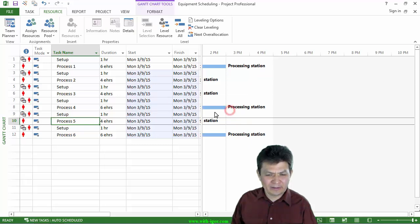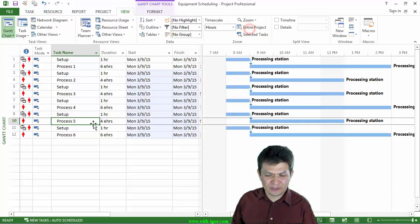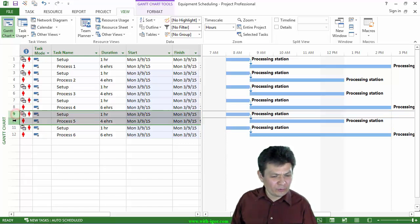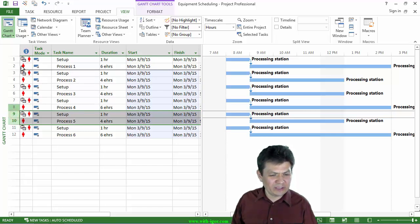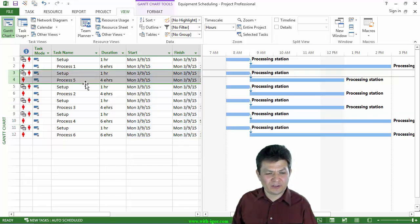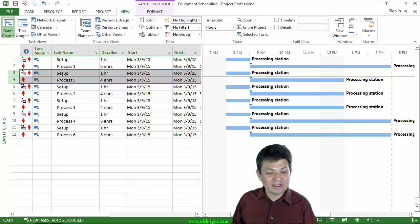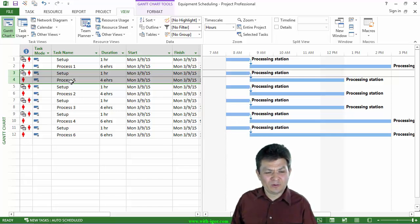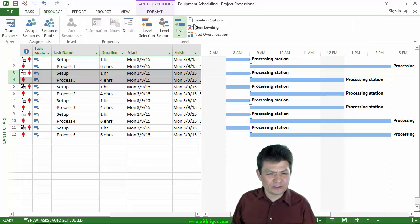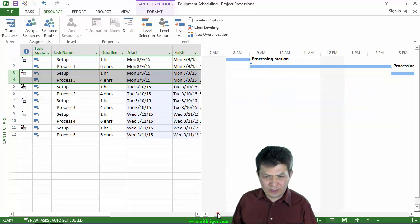What you need to do is set entire project. I need to select both the setup and process 5 and move it in my list to the position where I would like to see it after I level. So here now I have setup and then process 1 and then setup and process 5. So that the process 5 along with the setup will be scheduled after the process 1. Let me level again a resource. And I can level all because my leveling options have been previously set up. I'm going to click level all.